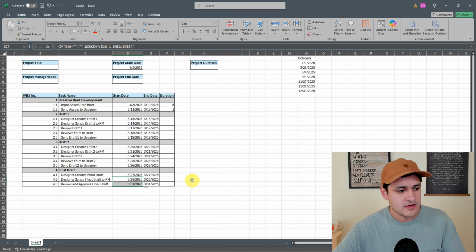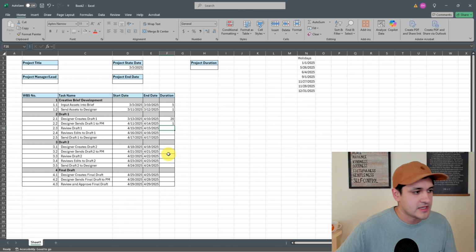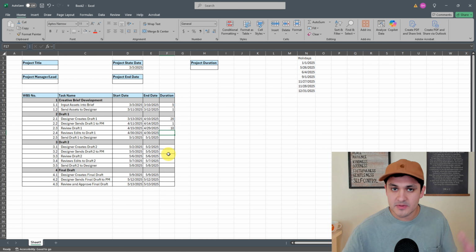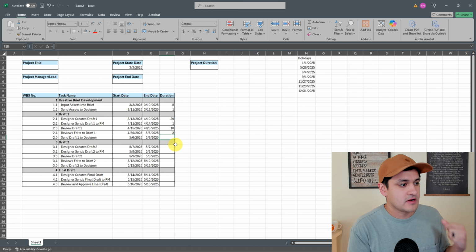All right, so now let me just plug in my durations. So let's just say it takes my designer 20 business days or about a month to create the draft. They're gonna send it to me, so I'm gonna say that takes 1 day to review. Let's say we take 2 weeks to review it because I need a team of people to review it, and that might take them 2 weeks, for instance. For me to review it, I'm gonna say, give myself 3 business days after everybody submits their edits to it.